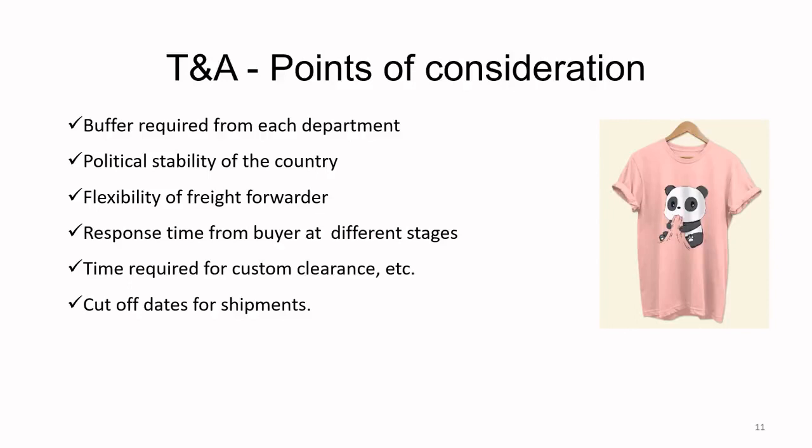And the cutoff dates for shipments. Again, like discussed earlier, the shipments leave from Mumbai only on Sundays. So your cutoff date is 5 days before that Sunday, which is Tuesday. So by Tuesday evening, your goods have to reach Mumbai. Only then will your goods be able to catch the coming Sunday vessel. So the cutoff date is Tuesday evening. That is the cutoff date for shipment in India.